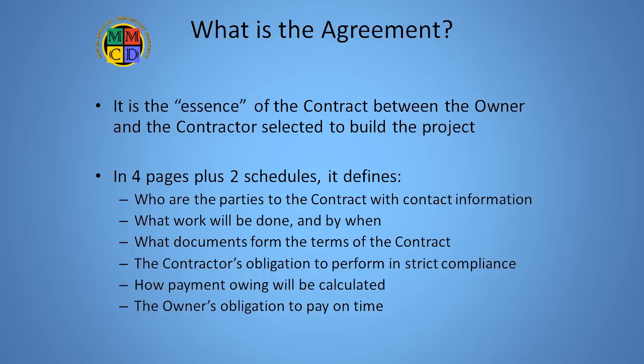It does this by defining what other documents are contract documents at the time of tender. Only contract documents have the power to impose obligations on one or both parties to the contract. So it's obviously critical to be clear about this.